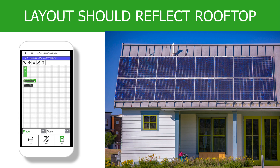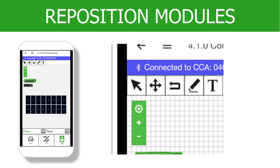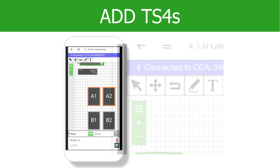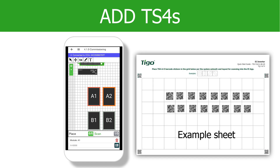It is highly recommended that the PV module placement mirror the actual location at the installation site — it will serve as a map for future maintenance and troubleshooting. Select the pointer on the top toolbar to move modules into their correct positions once they have been placed. Once all modules are placed, it is time to add the Tygo TS4s. There are two methods for TS4 entry. Regardless of which method, you will need the stickers that were placed on the site layout sheet or cardboard discussed in the installation lessons.